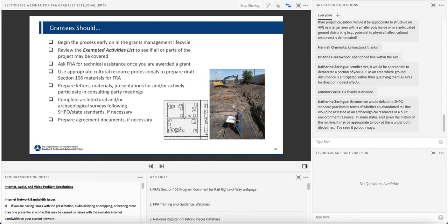For final design and construction grants, in order for environmental review activities, including Section 106 related work, to be eligible for reimbursement, they must be included in your grant application, and most importantly, in the USDOT FRA approved grant agreement scope of work. Overall, eligible costs may vary by grant or track 1, 2, 3 and/or grant program. Check the Notice of Funding Availability, or NOFO. It includes an FRA point of contact who can answer your questions when you are preparing or before you submit a grant application.